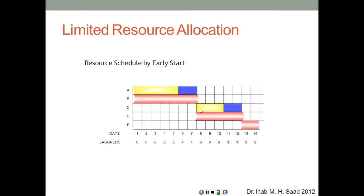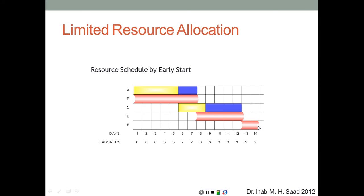After moving activity C, resource peaks disappear and utilization stays within the maximum limit of 6. The project duration remained 14 days — unchanged — so the project finishes on time while meeting all resource constraints.